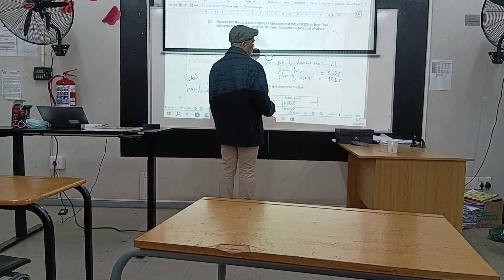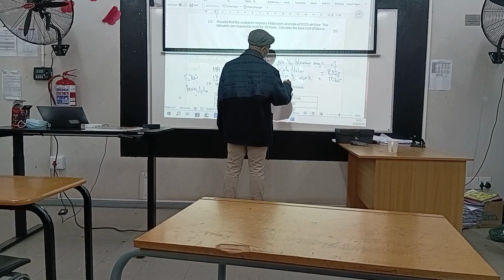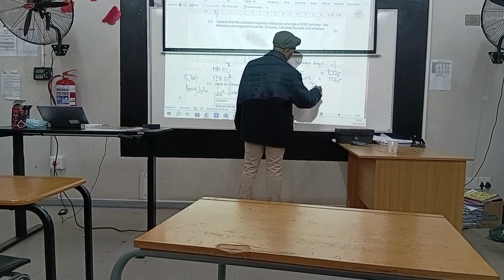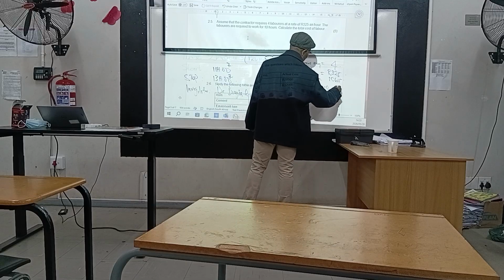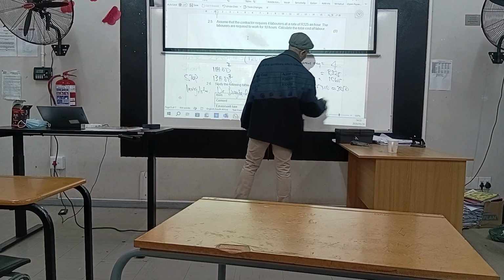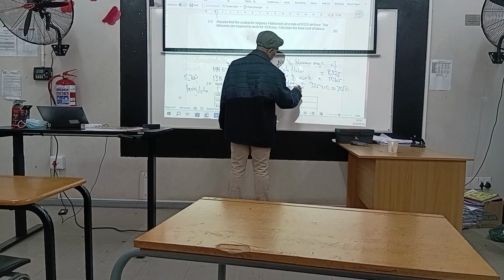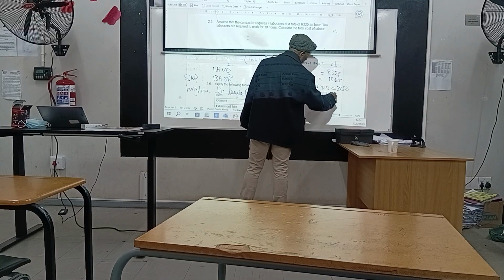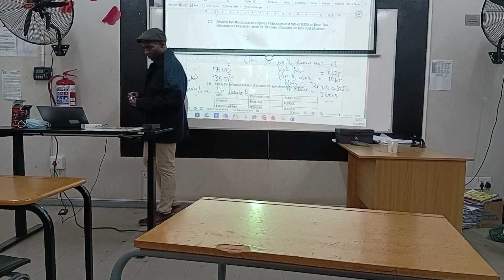So, right. So for one labor equals 325 times 10, right? Which is 3250. Therefore, 4 laborers equals 3250 times 4. Right. So that will give you the answer.